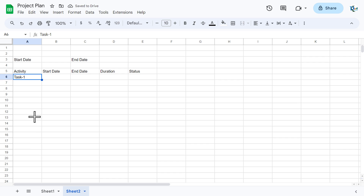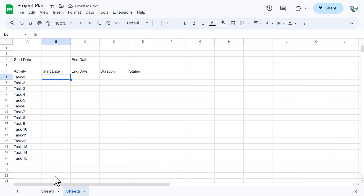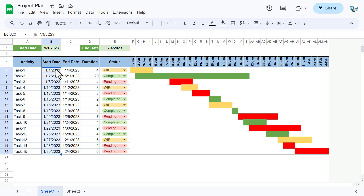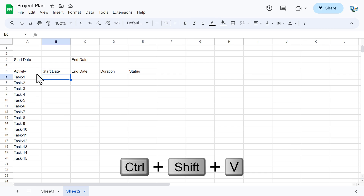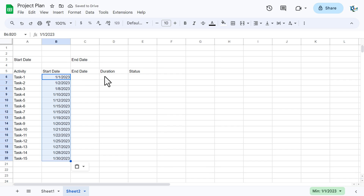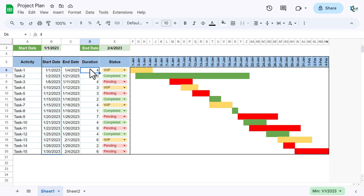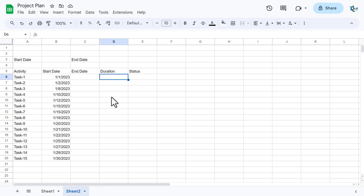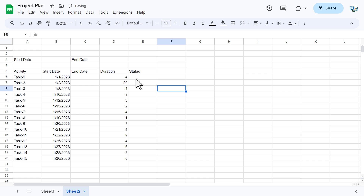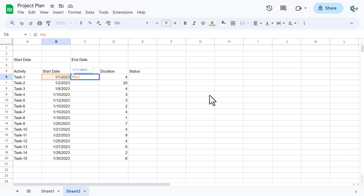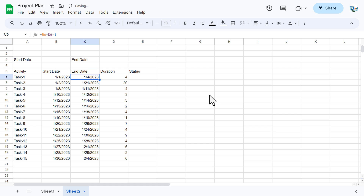I'm filling down the task names till Task 15. For the Start Date I'm copying sample data and pasting values only (Shift+Ctrl+B). I'm copying Duration values the same way. To calculate End Date, use the formula: Start Date value plus Duration minus 1. Fill this down — so a range from the 1st to the 4th is four days, matching a duration of four.